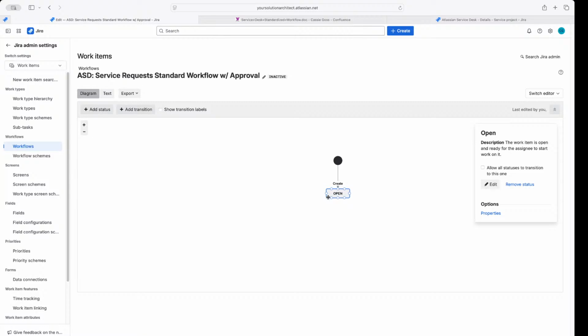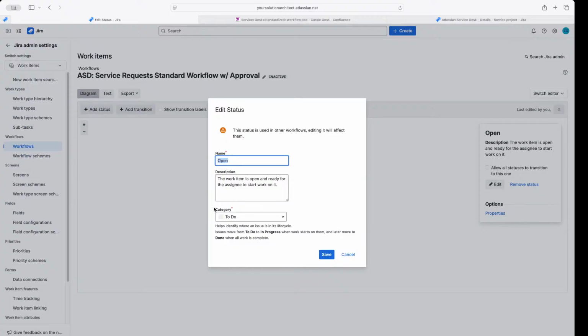And how that actually comes about is you can click on the status and you can hit edit. You can actually see that there's something called a status category. These status categories really are valuable because when you are JQLing to create a filter and automation later, you don't want to have to name every single to-do kind of gate status. So you don't want to have to name received or whatever the 1 million ones you have in your environment are.